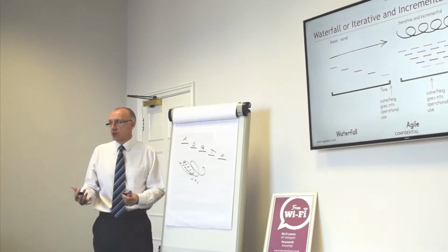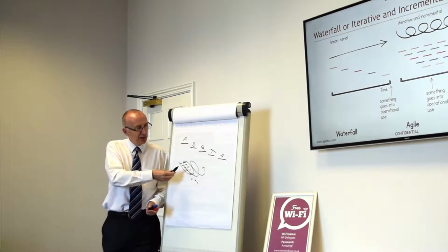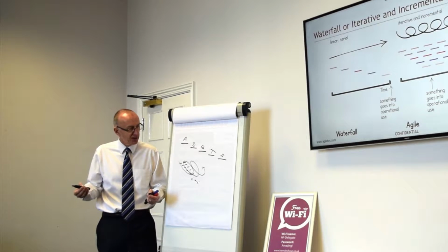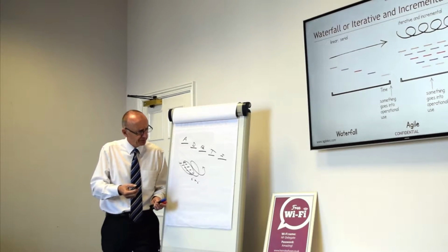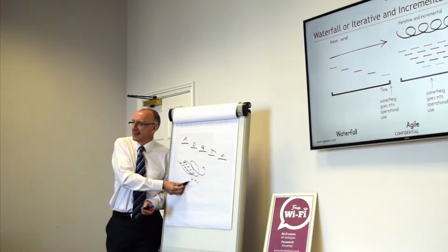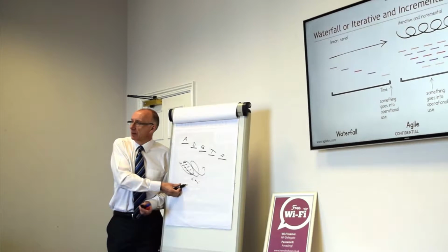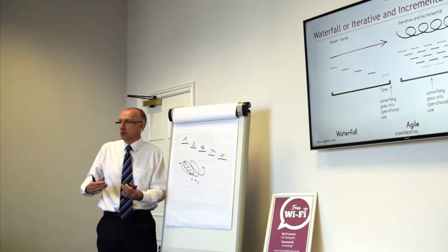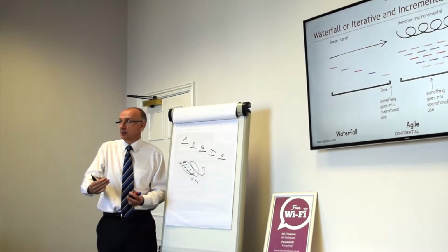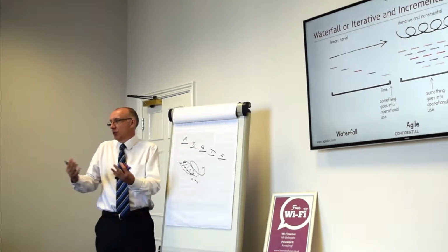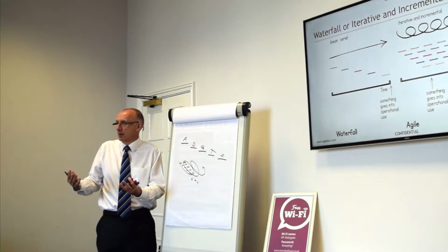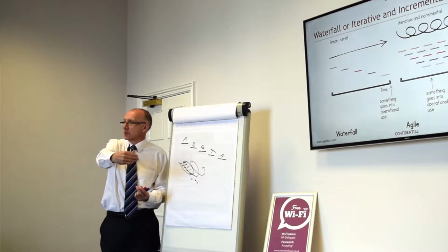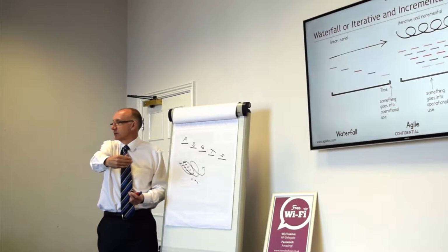And this is why when you look at certain projects, you might say, well, yeah, it's a website, that's really easy to do. It's a marketing campaign, that's really easy to do. It's a bridge. Now, delivering a bridge incrementally might be a little bit tricky, okay? If you're using iterative and incremental and you're using Agile, you would go with a 90% solution. So we've got 90% of the features up on the website, that's good to go. Whereas if the bridge only gets 90% of the way across, it might be rendered next to useless, okay?